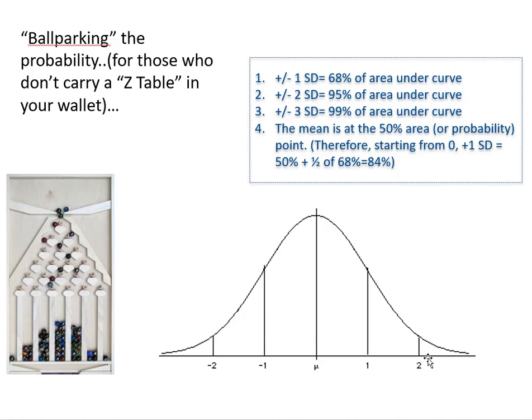Here's the thing. If you can calculate the project mean, which is the middle of the normal curve, and the project standard deviation, you can calculate how many units of time are equivalent to a single project standard deviation. So then if you're asked to reduce a project by so many units of time, you can convert that to how many standard deviations you're reducing, and then use that to indicate the probability of actually achieving that schedule.